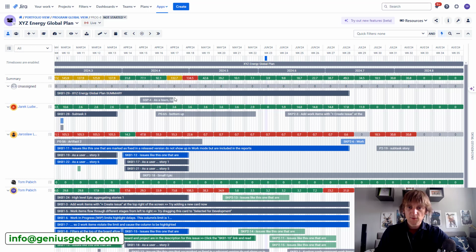And in this case, you will actually see that some of the tasks overlap the months exactly, right? Like these two, for example, over here, they are adjusted to the months, because that's also something that you can do in BigPicture, that when you plan something for a specific time period, it automatically stretches its duration for the whole time period, which is one of my favorite functionalities really when you're doing the planning.